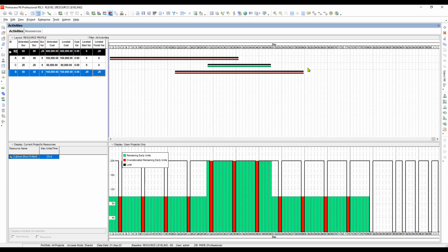And accordingly, the finish date will go along for 20 days until it matches with the leveled resources. Okay. So in this condition, running the leveling delayed has an anticipated delay of negative 20.